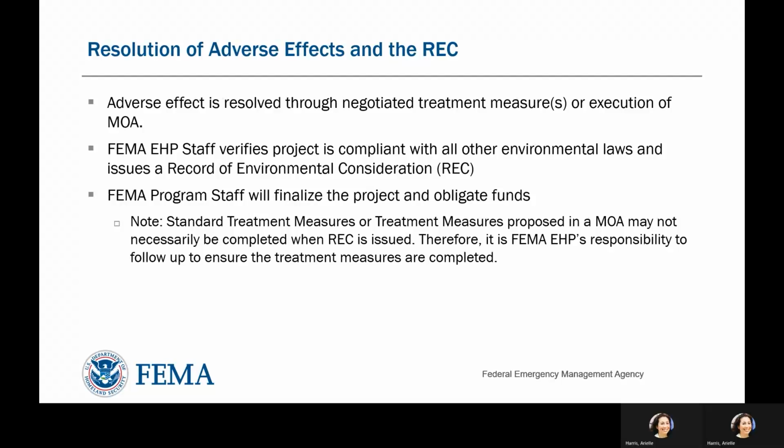Ultimately, an adverse effect is resolved when the negotiated treatment measures, either through standard treatment measures or an MOA, are completed. However, FEMA may complete the EHP review of the project prior to the resolution of the adverse effect. The Record of Environmental Consideration, or REC, issued by EHP for the project will note the adverse effect determination and document what types of treatment measures or MOAs were negotiated. It is FEMA's responsibility to follow up with the applicant and any consulting parties to ensure that the resolution of the adverse effect remains on time, funded, and fully completed within the period of performance of the federal grant.